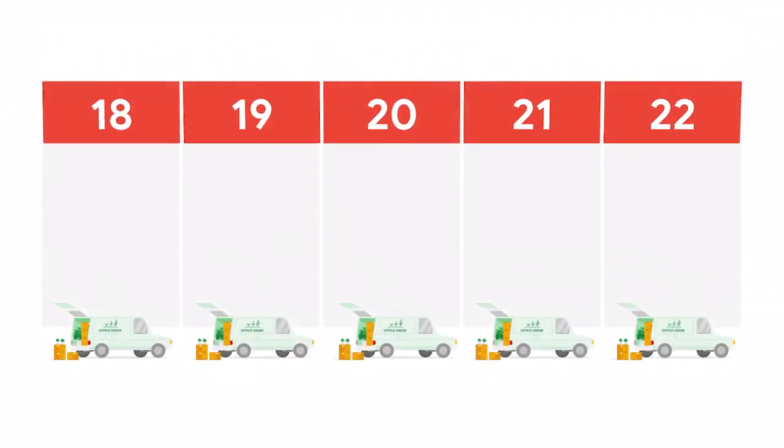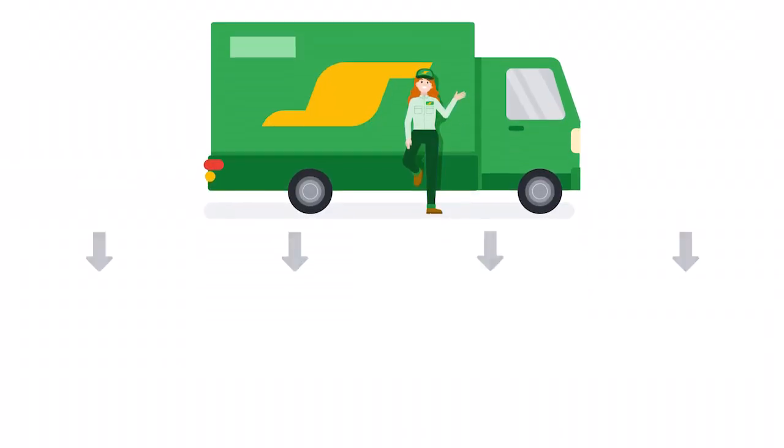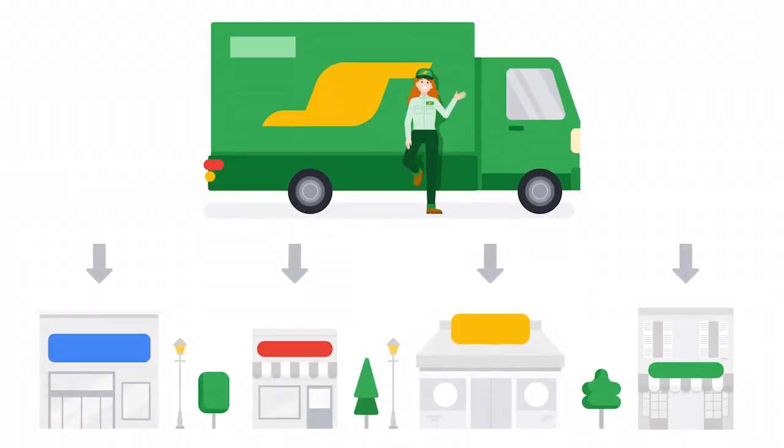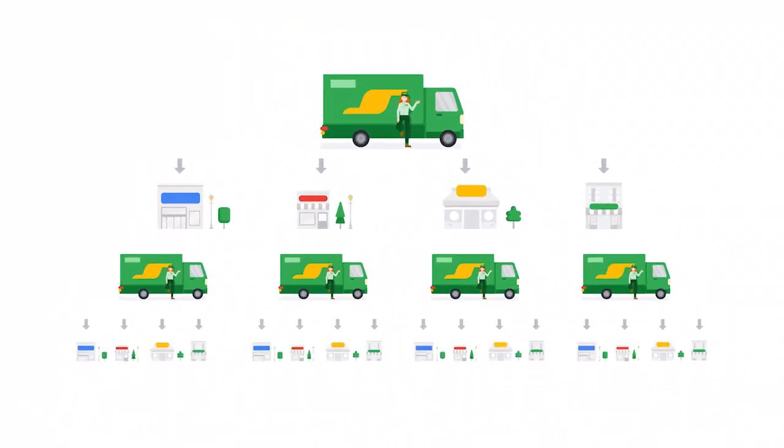Let's imagine capacity planning in the context of our Plant Pals project at Office Green. If you know that you'll need to deliver plants to 100 customers over a period of 5 days, then you'll need to determine if you've hired enough delivery drivers to meet that deadline. If one driver averages 4 deliveries within an 8-hour workday, then you know you'll need to hire at least 5 drivers to complete the work on time.